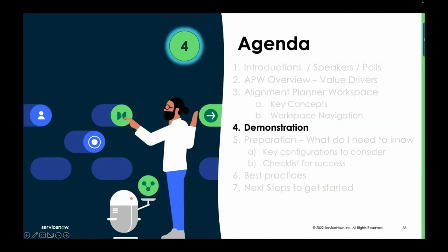Well, first question is alignment to a business goal, business strategy, right? So prioritization is the first key thing, and you can do that in APW, which is, okay, I have those 10 projects. I put them into prioritized mode, right? So they show up in a roadmap. Are they linked to objectives and goals? Actually, you could do that technically right in the backlog. You could work in the backlog and say, hey, here's 10 projects. I've linked 5 to company goals. I've got 5 that are not. You could stack rank those right off the bat. First thing you could do.